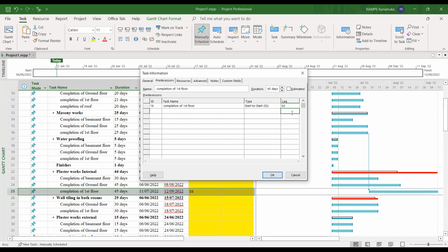So if I complete the first to second floor masonry work for the first 5 days, then from that stage I can complete some rooms. And once I complete a room, I can give those rooms to the electrical and plumbing people, and also the plastering works. So that's why I mentioned that I'm not going to wait 5 or 10 days.